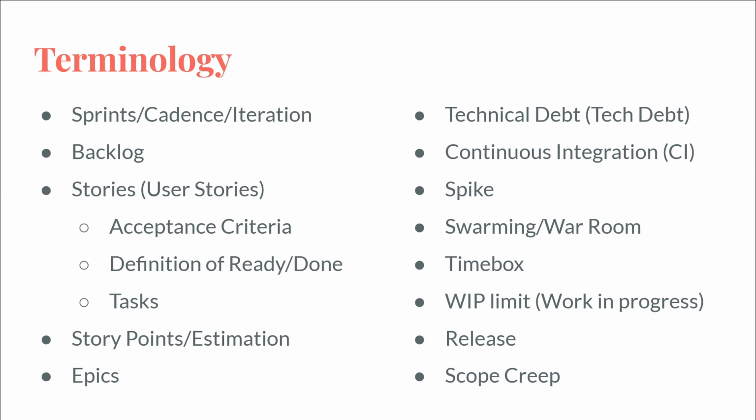Are there any other tickets blocking it? Are there other people working in a similar part of the code base at the same time, which is a common thing to try to avoid so you don't end up with merge conflicts? Are the designs finished? Is the API finished? Those are all things where if it doesn't meet whatever your team's definition of ready is, then it shouldn't be brought in, and a different ticket should be brought in instead.